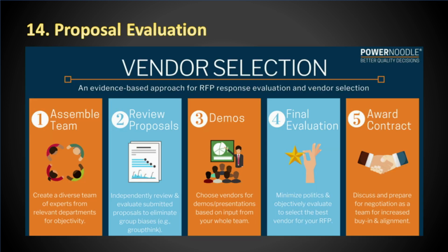Proposal evaluation. The proposal evaluation techniques refer to the process of reviewing the proposals given by the suppliers to support the contract award decisions of the buyer and the project team. The proposal evaluation techniques are one of the tools of conduct procurements, which is a process of obtaining the responses from the seller, including its selection and awarding of the contract.